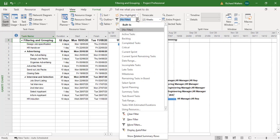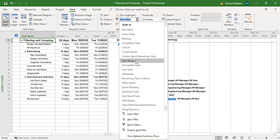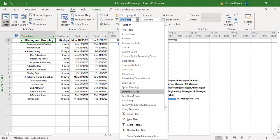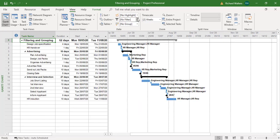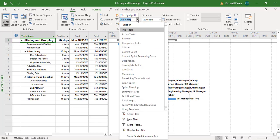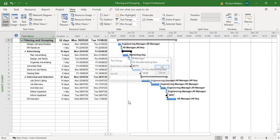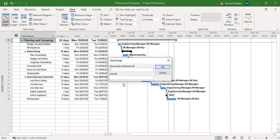And we could, there's date range filters, summary tasks, filter via all the summary tasks. Try this one. And then we'll try task range. So there's all the summary tasks. Now filter, task range. So now I only want to filter for task 10 interview selection down to 16. So 10 and 16. And there we go.